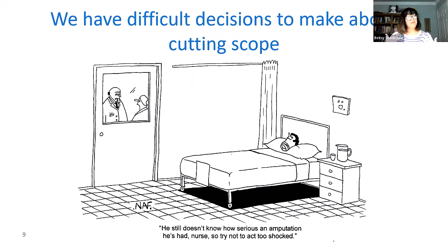So with our budgets being so tight, what we're talking about is cutting as many non-essential features from our programs as possible. For example, we had two projects, each costing $1 million to deploy. One had a return of $20 million and the other one was $4 million. So what would you do? Would you do one or both?